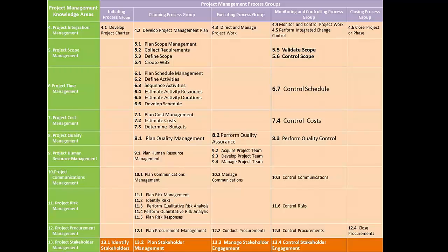We said earlier that we start a project with a contract and a SOW. This was further elaborated in the procurement management knowledge area, where we mentioned that as soon as a procurement decision is taken, the project manager or the project management team selects a suitable type of contract and also creates the statement of the work which is part of the project.